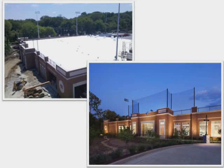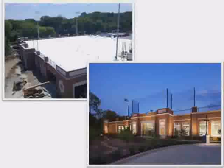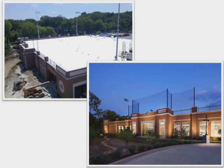The MBA parking garage was a project that did not fall short on its list of challenges: a site with limited access, blasting within a residential neighborhood and an occupied school campus, 60 calendar days of delay due to permitting and Mother Nature, the construction of a rifle range and facility maintenance shop within the structure, and an artificial turf soccer field on the roof. Despite these and other unique challenges, the project was successfully delivered to the client on time.